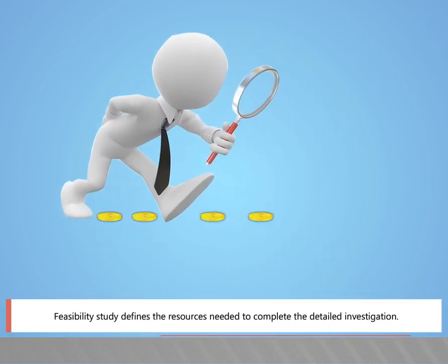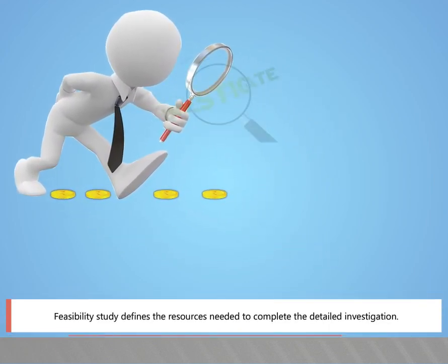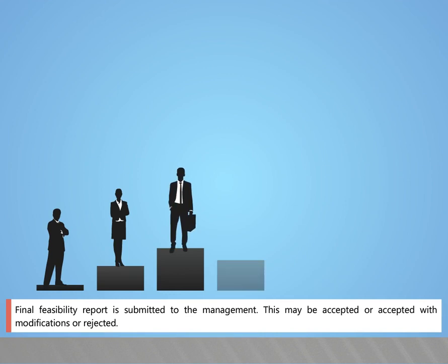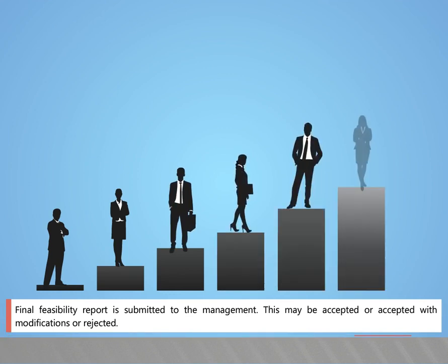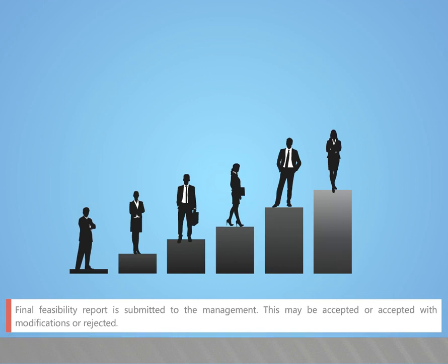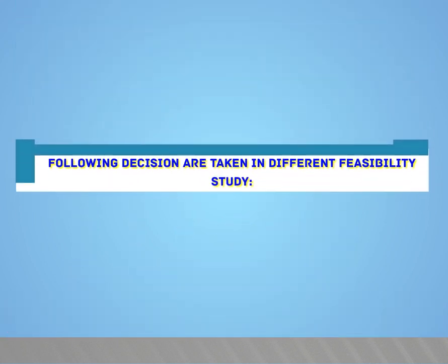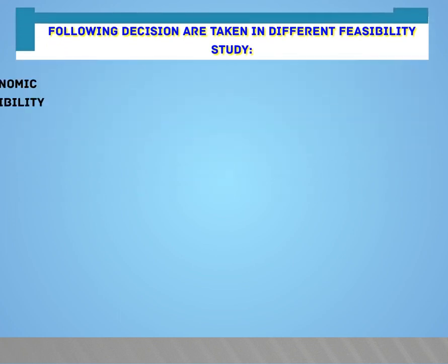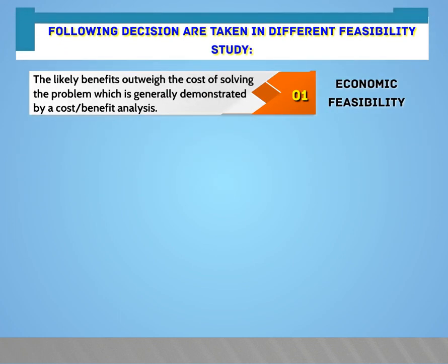Feasibility study defines the resources needed to complete the detailed investigation. The final feasibility report is submitted to the management. This may be accepted, accepted with modifications, or rejected. The following decisions are taken in different feasibility studies. Economic feasibility: the likely benefits outweigh the cost of solving the problem, which is generally demonstrated by a cost or benefit analysis.